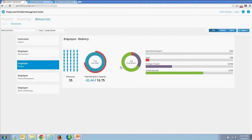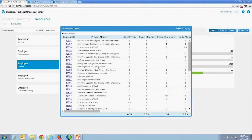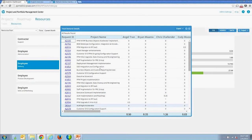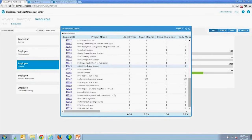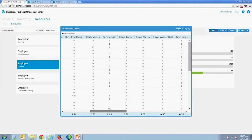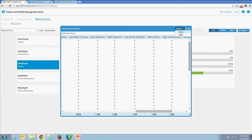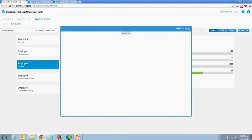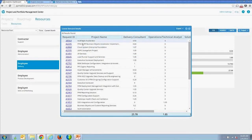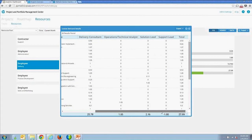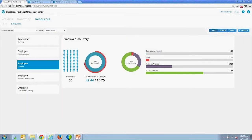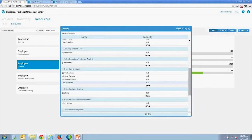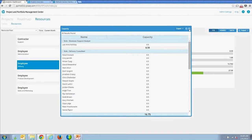This shows the delivery org at 153% overutilized in the current period, assuming all demand is met. You can drill in to see each resource and what they're assigned to — ultimately a table of every resource in the pool and their project assignments, exportable to Excel. Similarly, demand is broken down by role, so you get a visualization of demand by role for the resource pool, also exportable.